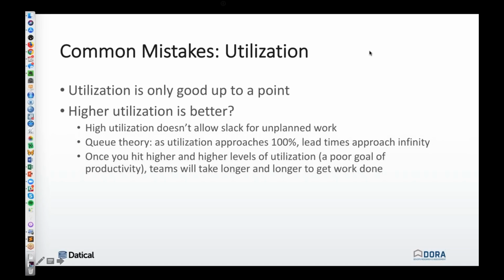And this idea from a manager to say, oh, we need to be at 100% utilization is not understanding how software is built. If there is slack built into a schedule, if we are at less than 100% utilization, the teams will use that time.